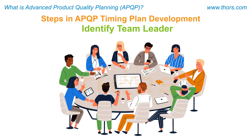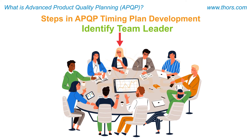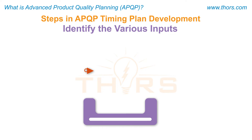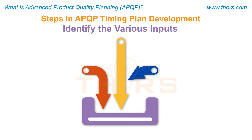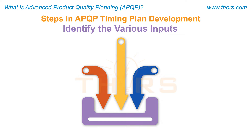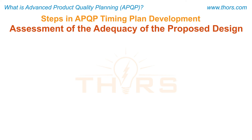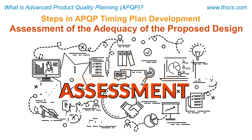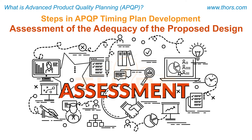In the second step, a team leader is identified from the team to manage the planning process. In the third step, the multidisciplinary team identifies the various inputs and defines the customer expectations on the product and the system. The fourth step is the assessment of the adequacy of the proposed design and the manufacturing feasibility by the multidisciplinary team.